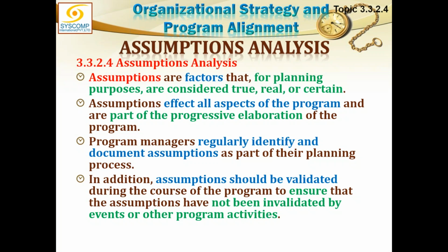But assumptions are marked flags, and as soon as an assumption is proven wrong, we should replace it immediately with a fact or another more appropriate assumption. Assumptions affect all aspects of the program and are part of the progressive elaboration of the program. Naturally, this is part of the progressive elaboration. We are improving with every step.